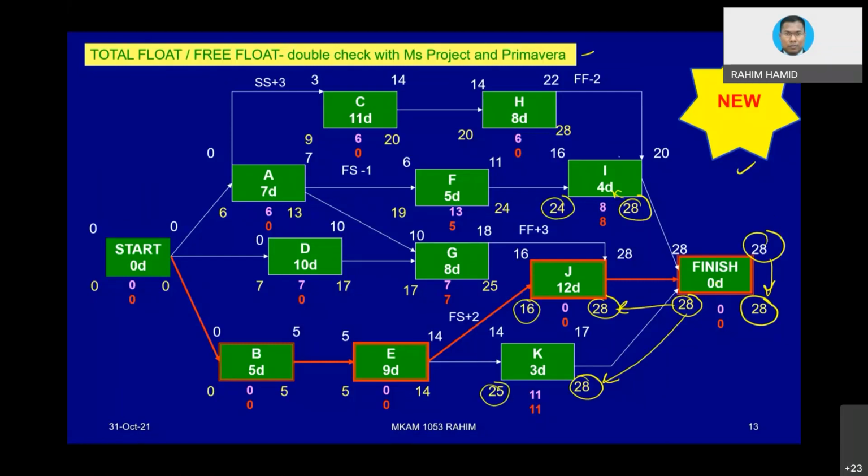Okay, remember, our consideration is basically 28 or 28 minus 2, which is equivalent to 30. So among these things, for sure, 28 is the lowest. So this figure basically stuck there. And then within the box, 28 minus 8 equivalent to 20. Then this one, you transfer here, 20 minus 11 equivalent to 9. Okay. So everything else will be straightforward. 24 transfer here, 24 minus 4 equivalent to 19. And then how about J?